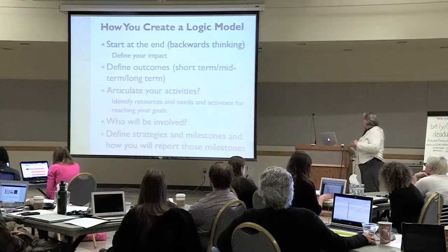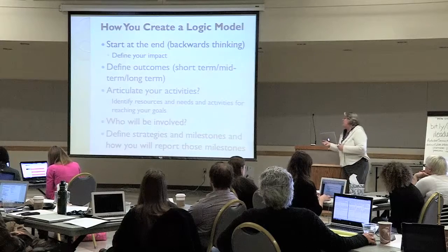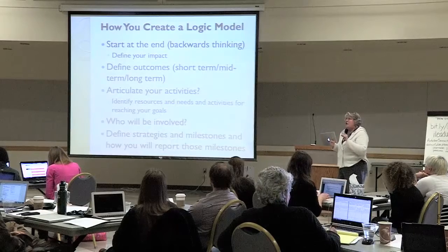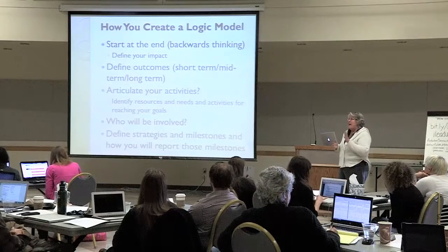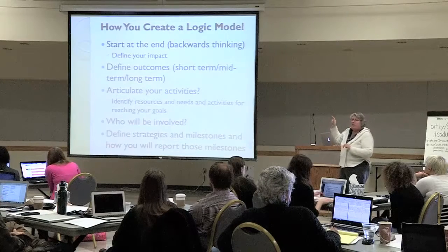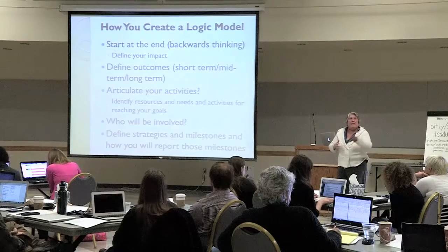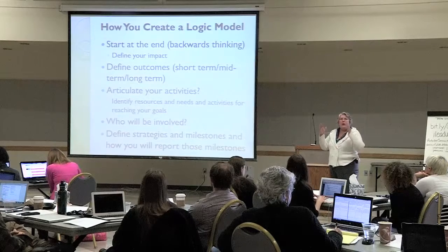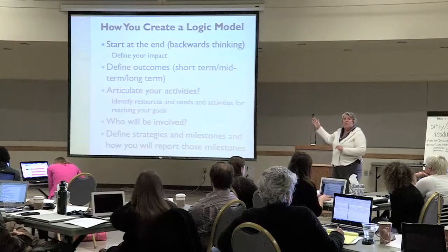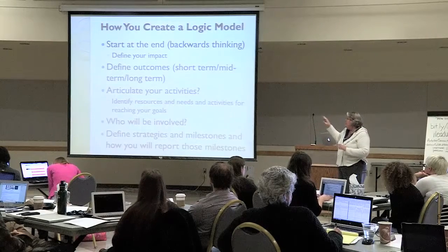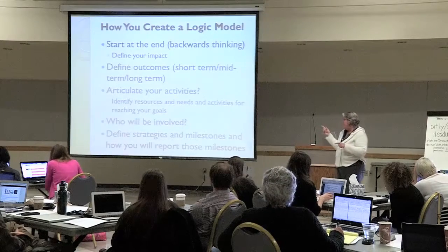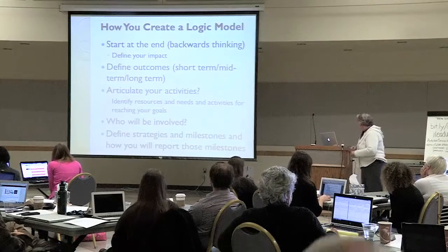So to develop how you're going to create a logic model, what we did yesterday was kind of that input piece. Today, I want you to just take a very short time, 5 minutes, to brainstorm in your group what your impacts are. So at the end of all this, not at the end of iLead, but the end, what's your vision for what you're going to have in the end? And those will be your impacts. Then you're going to kind of come backwards from there, and you're going to look at your outcomes and your activities. Today, we're just going to focus on the outcomes.